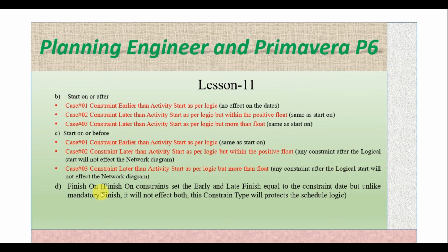Now the next case is finish on. Finish on constraint sets the early and late finish equal to the constraint date, but unlike mandatory finish, it will not affect both. The constraint type will protect the schedule logic.